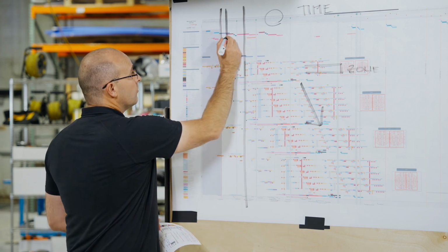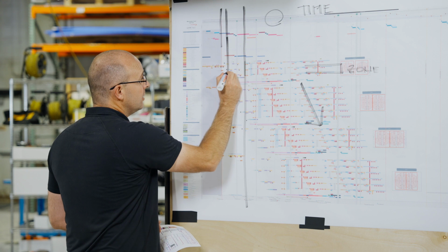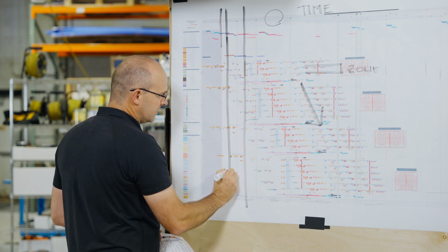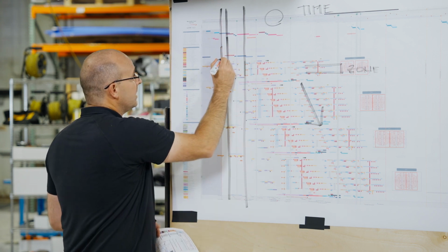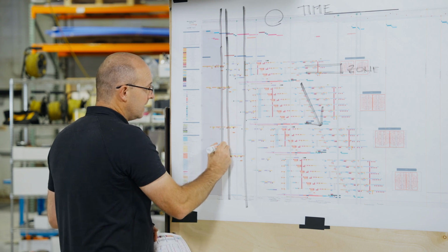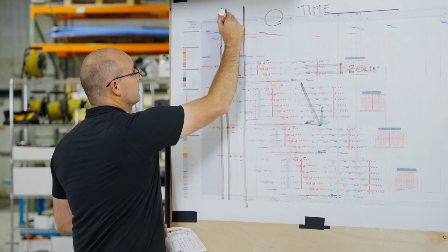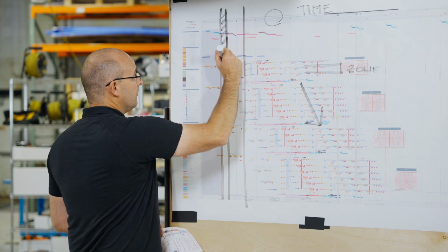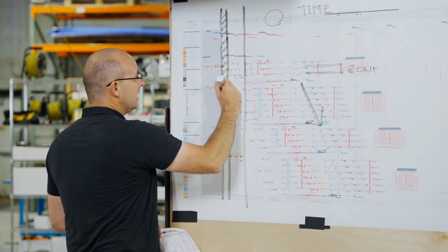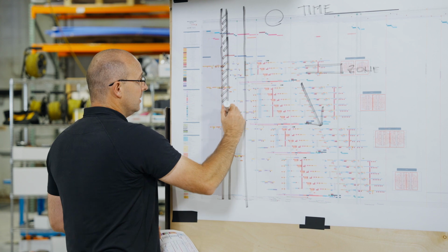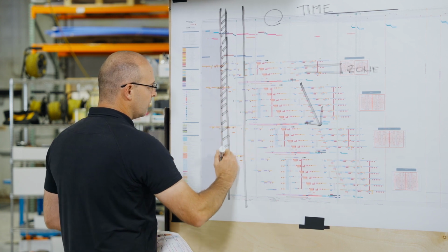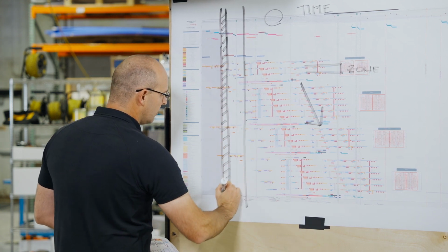In other videos I explain how to do those specific meetings. But once you have your look ahead done, you can safely filter out of this actual plan the weekly work plan, meaning next week's plan, or at a minimum, the next takt time, the plan within. Now, what happens here is it's pre-populated. So when you bring this into your weekly work plan format, it's already there.